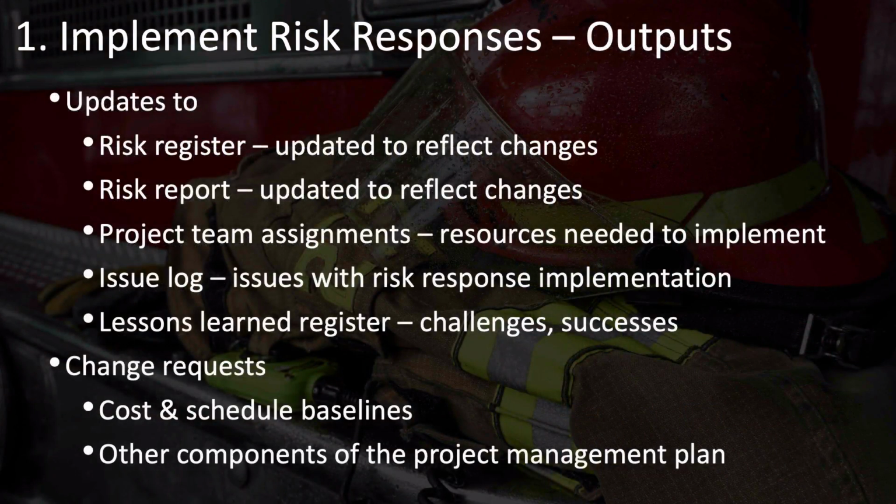Now to the outputs of implement risk responses. Remember that there are no new artifacts really that are generated as a result of this process, but there are many updates, including updates to your risk register and risk report to reflect any changes that happen during the course of the project. All sorts of changes can happen. Your risks and your evaluation of risks can change. Also, your risk owners might change, or the individual responses that you come up with may need some adjustment along the way. Any changes such as this need to be updated so that your risk register and risk report are kept up to date.